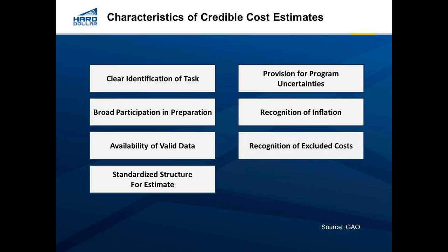Another thing that is interesting is part of the accountability of the estimate is making sure that when we do need to exclude costs that we document that there's full disclosure, if you will, about anything that has been decided to be excluded and the rationale behind that.